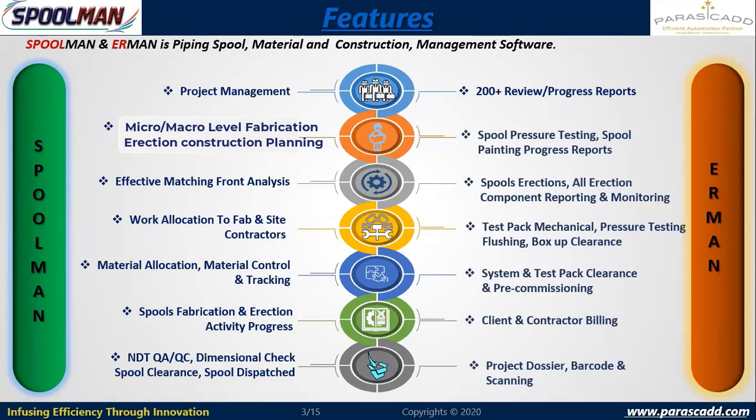That is, after completing welding, I will not be able to do fit up. So system will take things in a sequential way. So the manual errors or manual manipulations, everything will be avoided here. And each of the progress will be recorded with timestamp. And further it goes to spool testing, painting, and spool erection, all erection component reporting and monitoring.